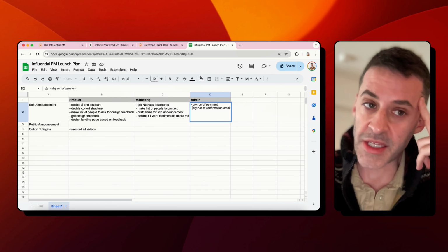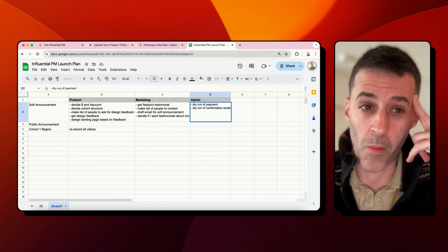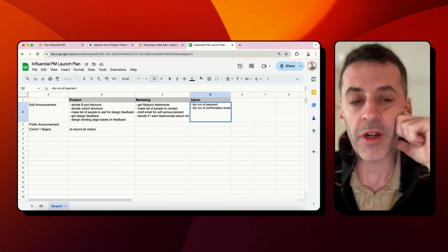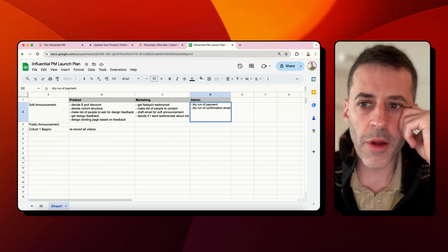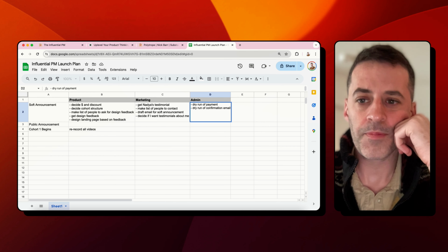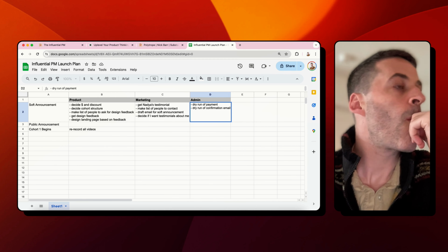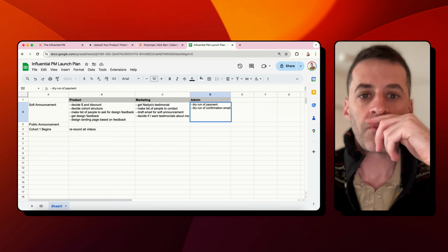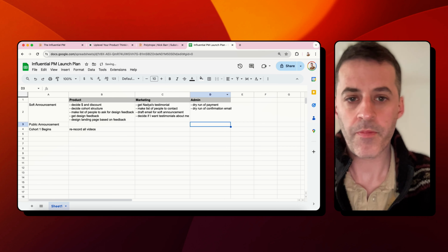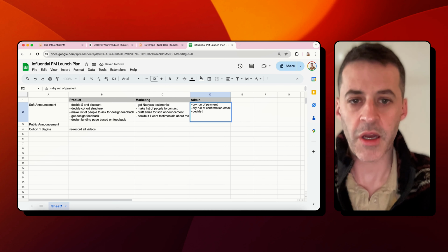I guess there's a go, no go. Like if nobody signs up, then there's no cohort. If 2 people sign up, I have to figure out if there's a cohort. If 100 people sign up, I have to figure out if there's like a wait list. So I need something there. So let's just do like decide if there's a wait list.